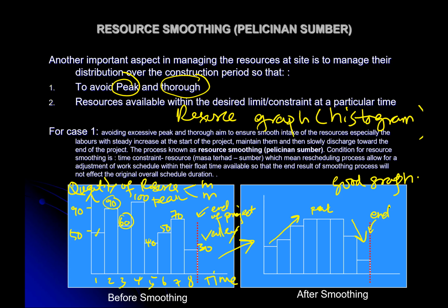You notice that the end of the project remains the same. On the 8th month, we do not touch anything. So meaning to say, we fix the duration. We only play around with the total float of the activities. Remember, why do we calculate total float in the first place?